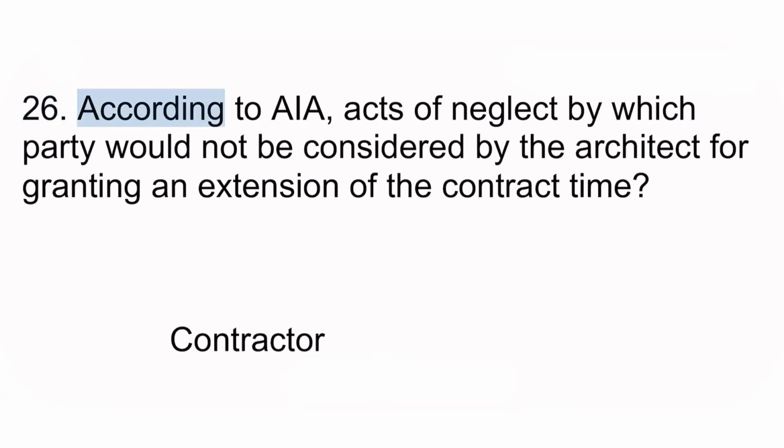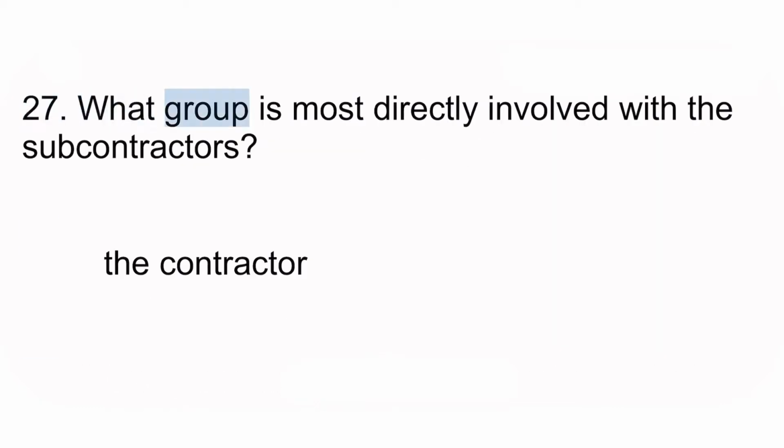26. According to AIA, acts of neglect by which party would not be considered by the architect for granting an extension of the contract time? Contractor. 27. What group is most directly involved with the subcontractors? The contractor.